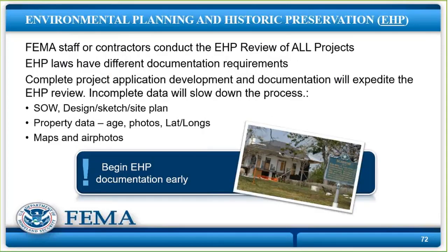Preservation planning. What you need to know is FEMA staff or contractors conduct the environmental historic preservation review of all projects that are selected for further review. That doesn't mean you can't help, but FEMA is the one who has to sign off on a finding of no significant impact, or sign off on a CADEX, or sign off on a biological assessment, or in the granddaddy of all things, an environmental impact statement.